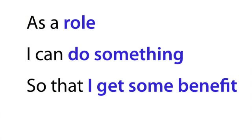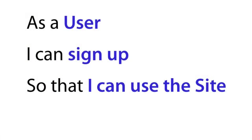User stories have two parts to them: the title and the acceptance criteria. The title is formatted as: as a role, I can do something so that I can get some benefit. For example: as a user, I can sign up so that I can use the site. So we now see the who, the what, and the why.